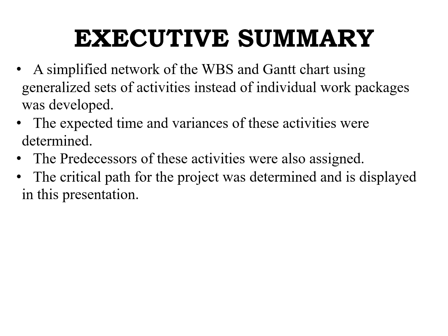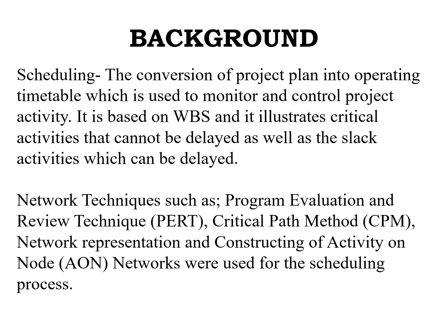displayed in this presentation. A background on scheduling: this is the conversion of project planning into an operating timetable, which is used to monitor and control project activities, and it is based on the WBS, and it illustrates critical activities which can't be delayed, as well as slack activities which can be delayed. Networking techniques used in scheduling are the program evaluation and review technique, critical path method, network representation, and construction of activity on node networks.